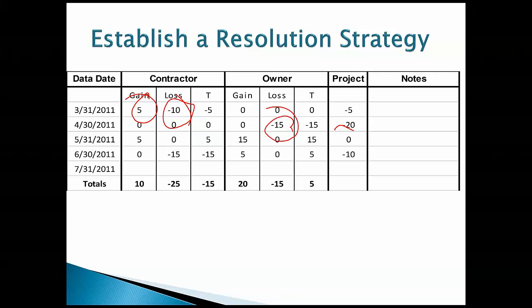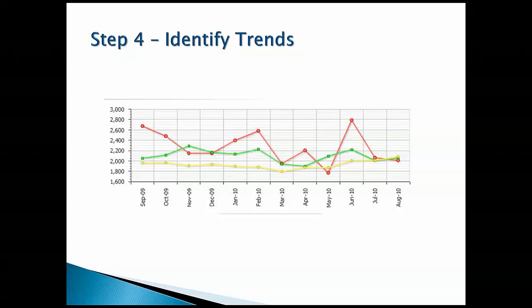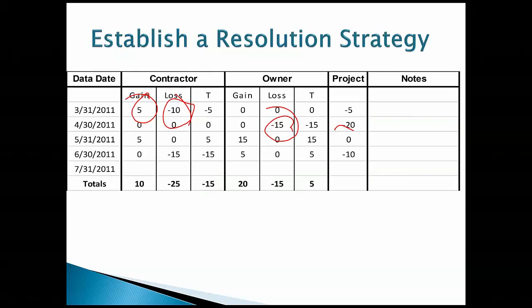5 of them were for this stakeholder, 10 were for this stakeholder, and here is how we can resolve this. This is where we need to end up in that process. So being able to monitor that critical path and manage milestones, you can use a tool like Schedule Validator, or you can just set it up in a spreadsheet where you take each month's update. You don't have to be a master scheduler to know what major milestones are. Just set them up in a spreadsheet and set up some formulas.